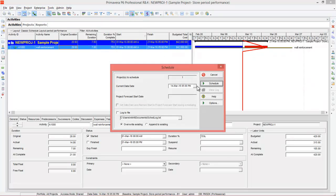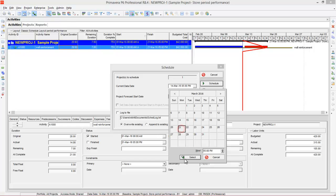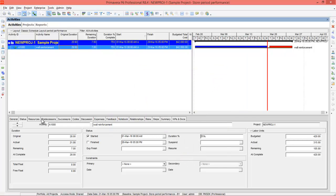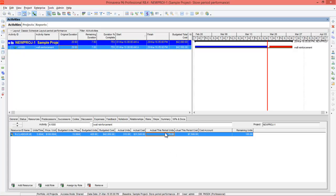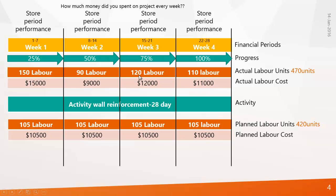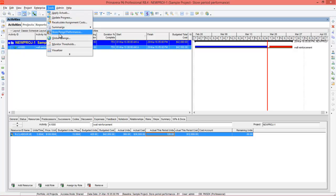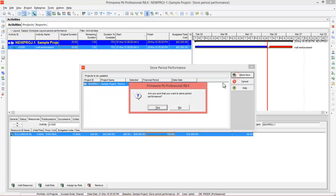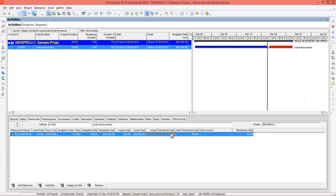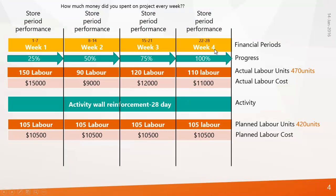Next update week 3: go to Status, set 75% complete, and reschedule to 21st March. Go to Resources — actual this period units shows 75 as calculated by the program using remaining units. But for week 3 we engaged 120 labors, so change the value to 120. You can see the cost changes accordingly. Go to Tools > Store Period Performance and click Store. Again it becomes zero.